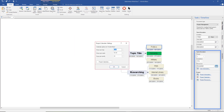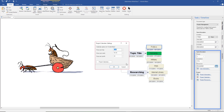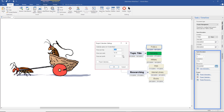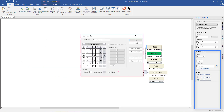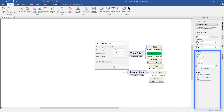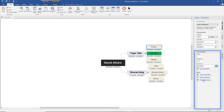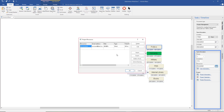Project Calendars — I mentioned earlier about working Monday to Friday, but you can change that. You might want days per month and want them to work every day. Select Project Calendars and you can see how it's currently set up. The greyed-out days indicate not working, so you can tap on them and add working hours if you prefer. Click OK, and the last option is Project Resources, which I showed you earlier.